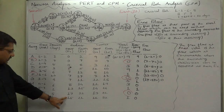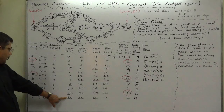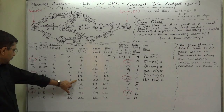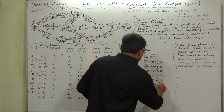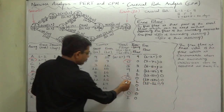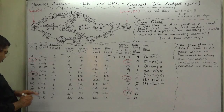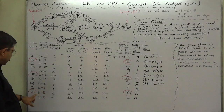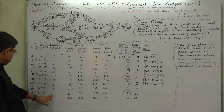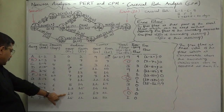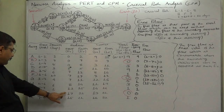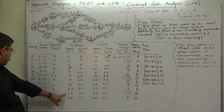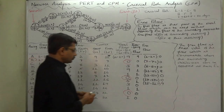For activity G, the succeeding activity is K. Earliest start time of K is 15 and earliest finish time of G is 11, so 15 minus 11 equals 4. Note that 4 plus 1 comes to 5. For activity H, its successor is J. Earliest start time of J is 17 and earliest finish time of H is 14, so 17 minus 14 equals 3.